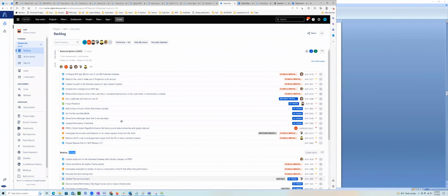So what they did is, and you see starting time March 1st and ending is March 15th. So they said this 15 tickets we can complete in 2 weeks. So they created a board with the sprint which separates these tickets, right? They're going to complete these 15 tickets by March 15 and push them in one shot to the QA environment, and we will test it there.